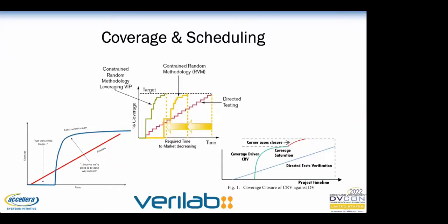These graphs usually gloss over the fact that the final target coverage that is being approached is a theoretical final number. Early in the project, we don't actually know how many coverage bins we will have at the end of the project. That number tends to grow at the beginning and then shrink a little at the end. Expressing the target as a percentage further obscures the fact that we're actually comparing two integers, what has been hit versus what has been coded.